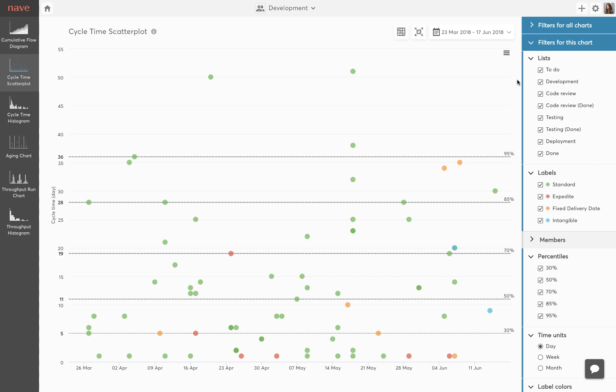Cycle time can be very useful in assessing your performance and defining service level agreements. It enables you to make accurate data-driven forecasts. The dotted horizontal lines are called 85th percentile lines. They determine the estimated completion time of a single task and the probability of that commitment being made.